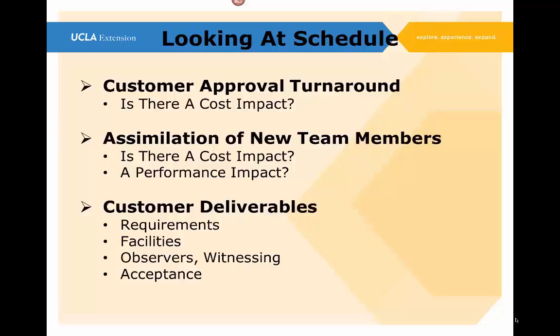Quite often, in some of the more technical projects I've had very extensive design reviews where they run for 2 to 3 days, and the customer has many representatives there, and not only that, some of the subcontractors, vendors to our project, had technical individuals there to participate and also to present. Quite often, the date moves around quite a lot before finally everybody can agree that this is an acceptable date, and then the date gets cast in concrete. And usually you don't have that kind of information when you're sitting down doing your project planning.